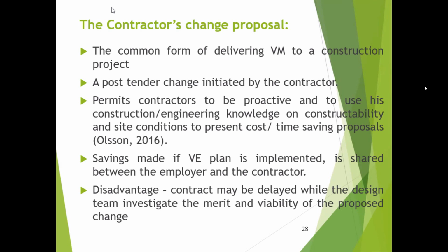Once the design comes to their hand, they come up with whatever possible change proposals. And when they bring those proposals, they need to ensure that they result in some cost saving or time saving, so that they are accepted by the client.